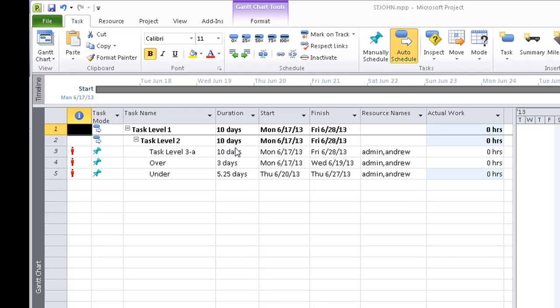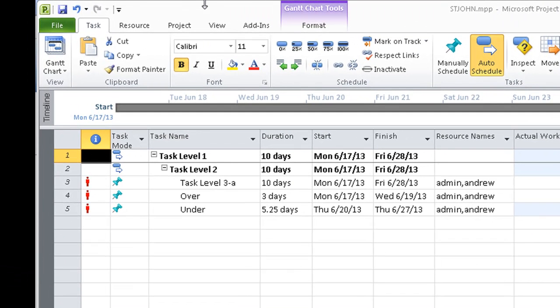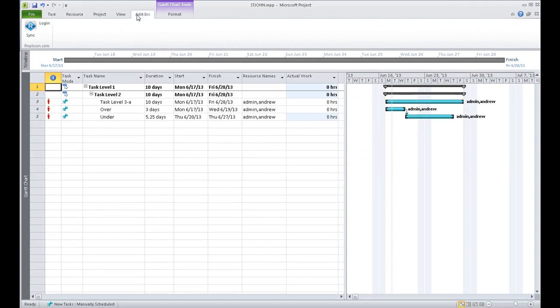And what happens with the new project tool is really a mapping. A mapping is determined at time of implementation between you and your implementation rep, and they use that mapping information to create the mappings for transfer, and those settings are in an XML file within the server. To access the integration, you'll notice an add-ins menu here within Microsoft Project that may already be there for you. If not, it'll be added when you add the Microsoft Project integration for Replicon.